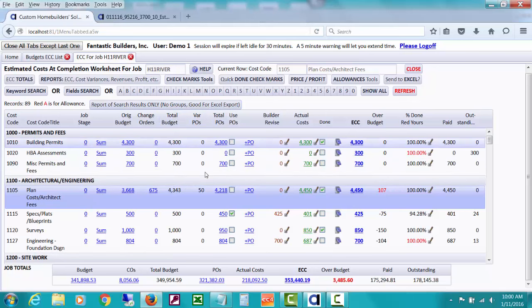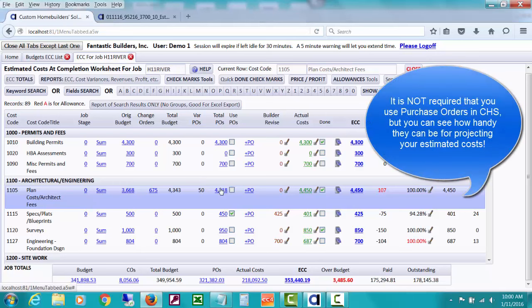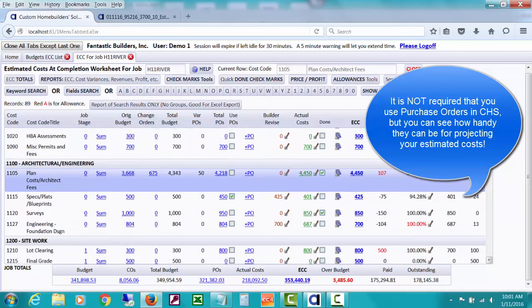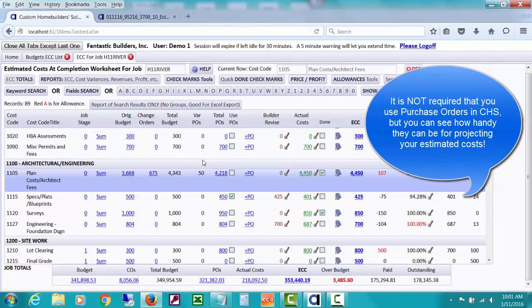The next column is for any variance POs, which you can see by drilling down on all the POs, just so that they'll stand out. Variance POs are usually issued if you're issuing a PO for something you hadn't considered in the budget, or you made an error, or something got damaged. You can watch PO videos about that.